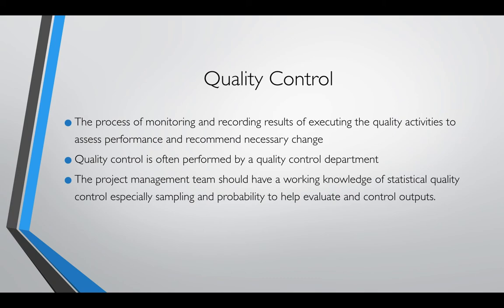Quality control is making sure that the monitoring and the recording of results and the tests being done are in accordance with what's being asked for in the quality management plan, that all those checks and all the recording and the monitoring are being captured, and it's being captured in the DWR. And everyone, again, has rights to look at the DWR.